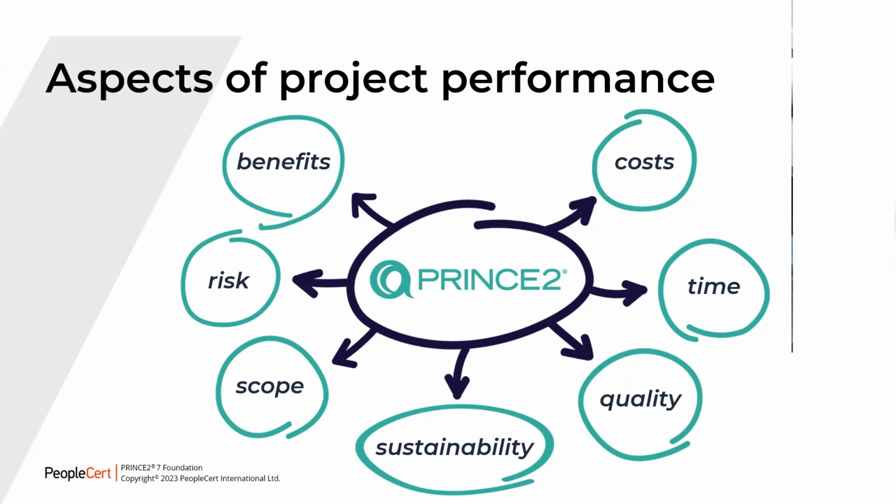Yeah, but that's also arguable, because if you did some analysis along the route, you might determine that the outcome of the project is no longer worthwhile. You see this with things like the train projects in the UK, where the rewards versus costs are altering to make the project unviable, because uncertainty is creeping in and scope is altering and various other variables that may be non-controllable. And these will be the aspects that you're using to determine that.